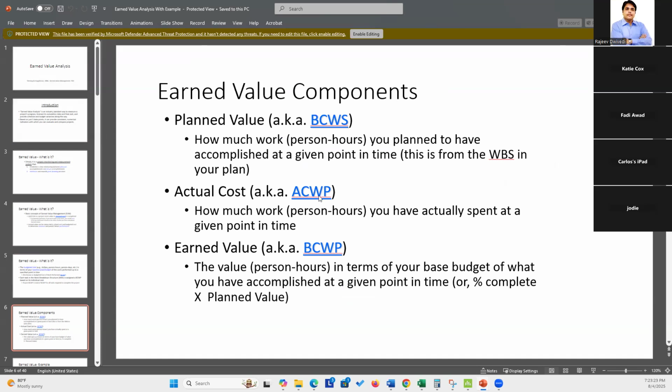So, planned value, actual cost, and earned value. How you can check these three things? Basically, every project has planned value. It means by this day, let's say you plan, by week number 6, 30% work will be done. So, this is when any project starts, and actual, you can see today only 24% work done. And actual cost, you can get to know from your account, $2 million or whatever money is spent so far, that you can get in real time because accounting keeps everything.